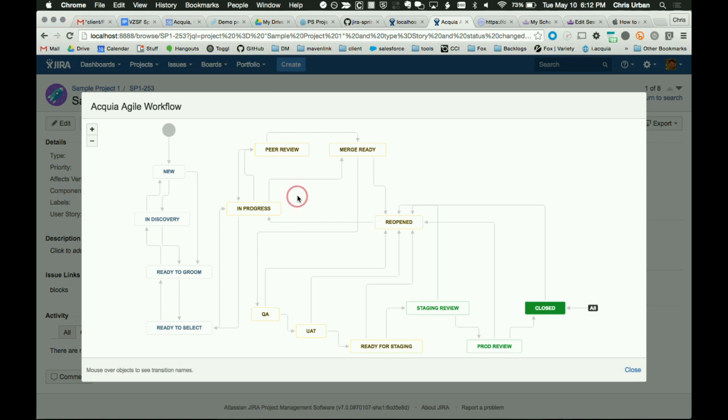this is the workflow I have set up. So QA came from either merge ready or reopened, right? So if I have a reopened state, that's all I'm doing in that other query, because you get to reopen from all other states. If your workflow is much simpler than this, just use whatever that state is as your measurement point. So it could be that it's closed and it was rejected. In my case, it goes back to reopen. If it goes back to new, say that it changed to new from closed, and that'll give you that total list.